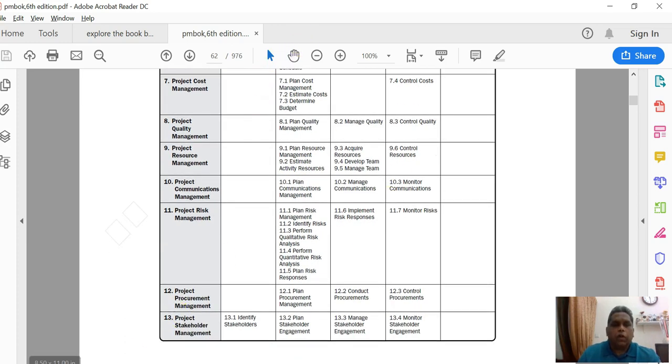And the next knowledge area is a knowledge area called procurement management. It's important that we look into procurement because we live in a world of dependency. Well, a particular organization might require help from contractors, from vendors, suppliers, partners to help them in achieving their goals. And we need a procurement strategy. When we talk about procurement, we are talking about things like, well, is it beneficial or is it of strategic, let's say, significance for us to make the product or buy the product? You do a make or buy analysis.